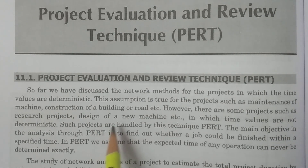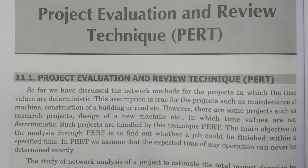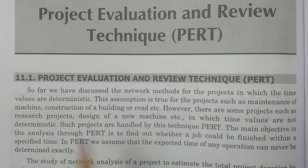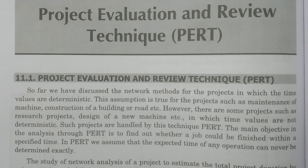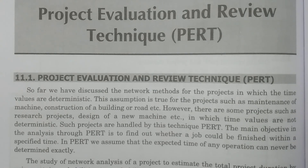In network scheduling, we have previously learned the Critical Path Method, CPM. In CPM, the projects generally have deterministic time values. However, some particular projects, like research projects or the designing of a new mission, will have non-deterministic time values. Generally, if you want to design a new mission, how much time it takes cannot be specified in a particular scheduled time period.